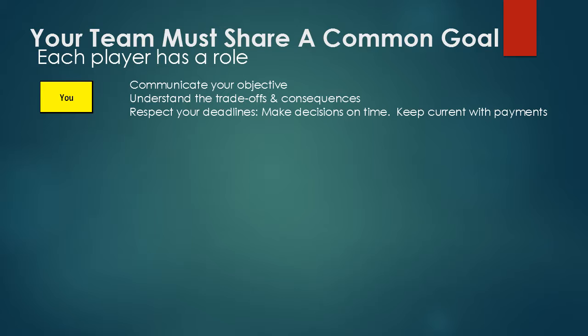During the design phase and as the build progresses, respect deadlines that fall on you. Most of these involve open decisions on materials or finishes, but you may have assumed some of the work yourself. Make sure you deliver on this according to the schedule and make sure your phase of the work accommodates the work that others must do. When it comes to physical work you perform on the project, in that capacity you are not the customer, you are part of the crew, and you have all the same obligations as other members of the crew.